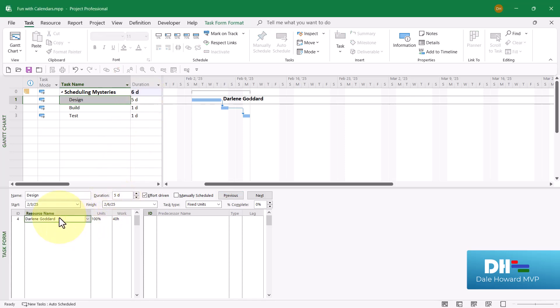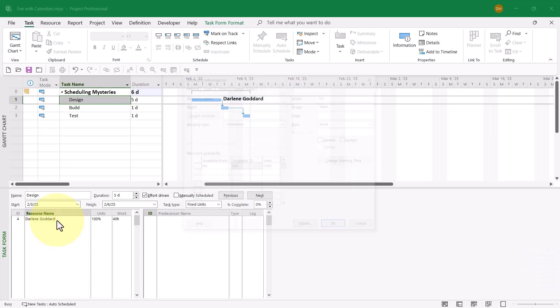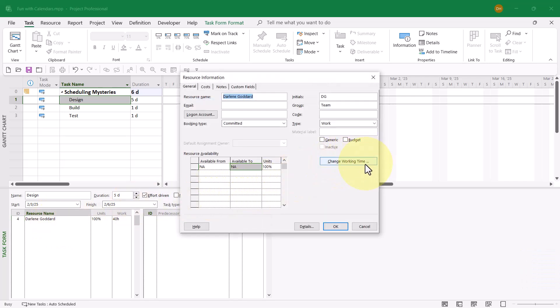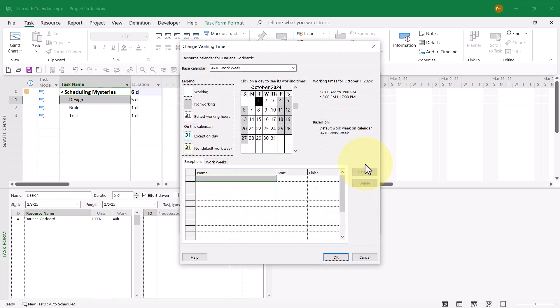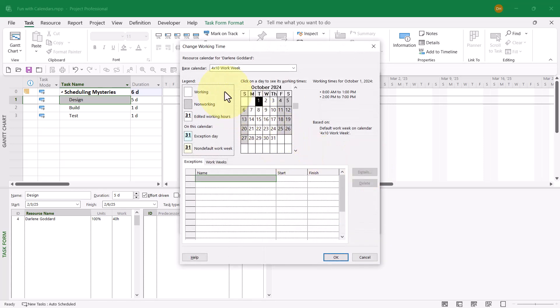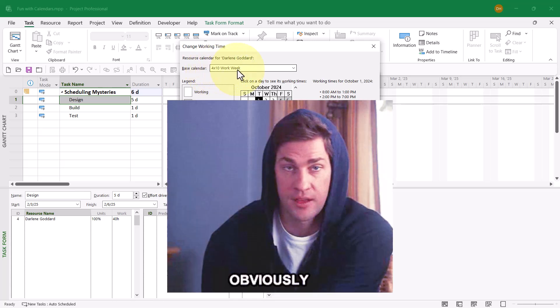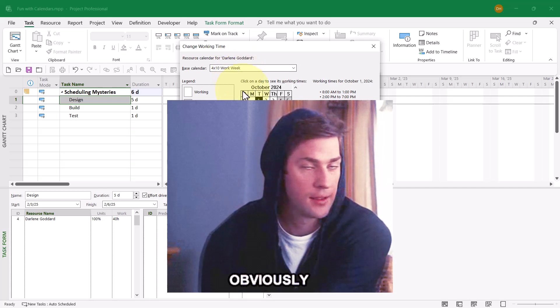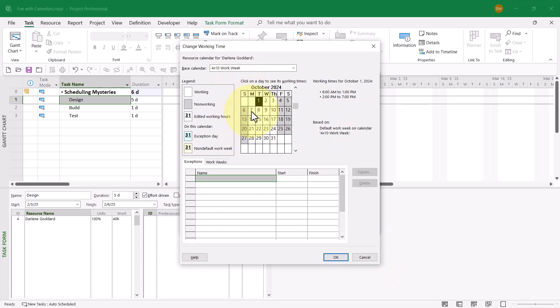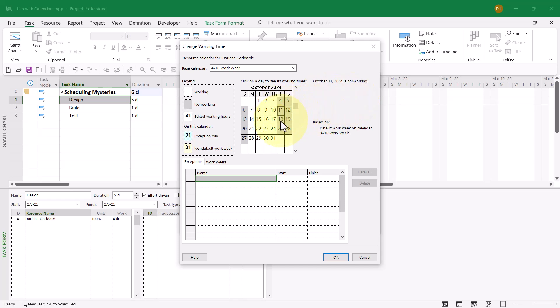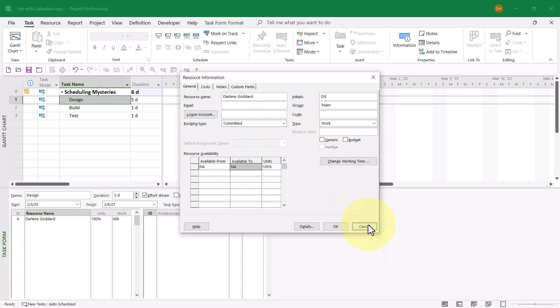Let's troubleshoot it. I'll double-click Darlene Goddard and go to the Change Working Time dialog. Here is the source of the scheduling issue. This is the resource calendar used exclusively for Darlene Goddard, but look at her base calendar that controls her working schedule: it's a four-by-ten work week schedule. Notice in the calendar grid, each working day, Monday through Thursday, the working schedule is 8 a.m. to 1 p.m., 2 p.m. to 7 p.m., and Fridays are non-working time.